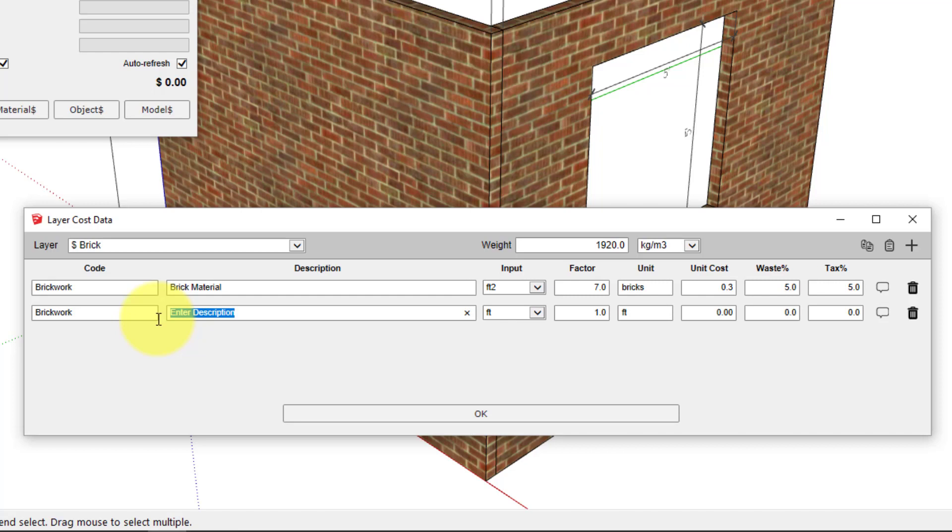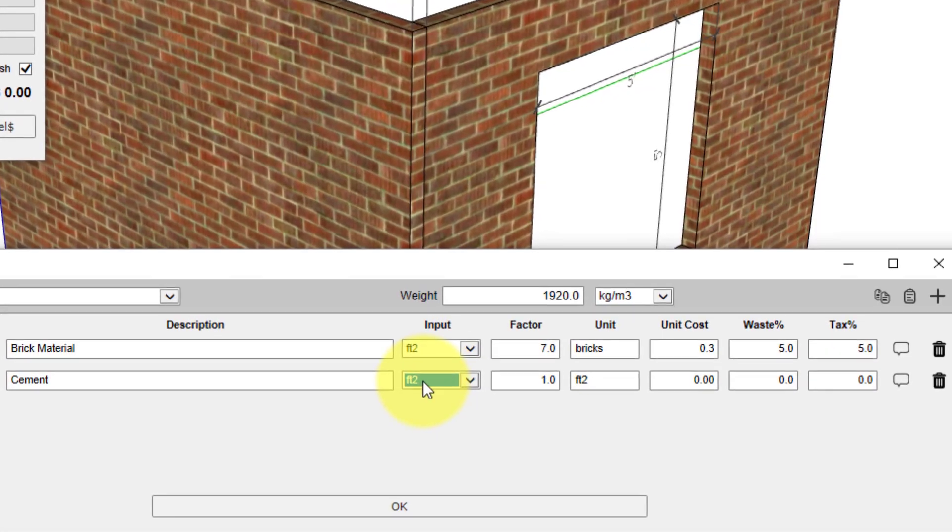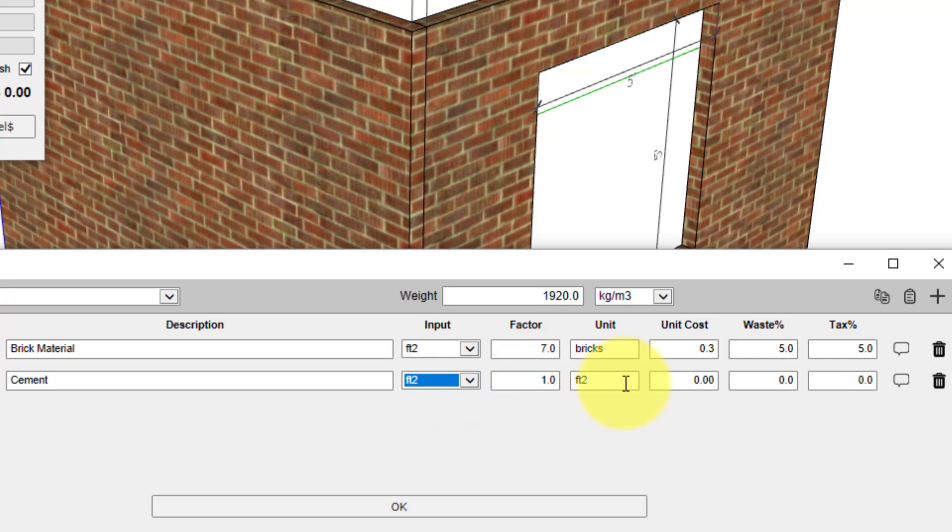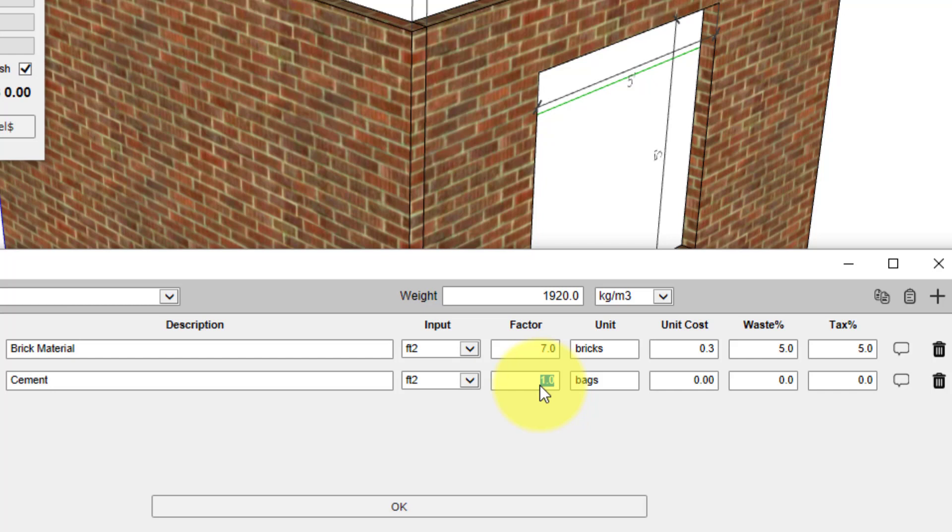Next is the cement. Again, we'll use square feet as the input quantity. The reported quantity we want to be bags of cement, and I've already worked out the number of bags per square foot that I need, so that value is 0.02.